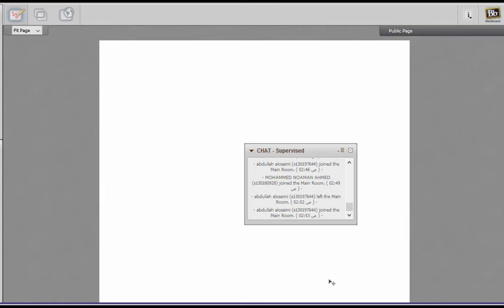It is not necessary to include the optional elements, but it may include the mandatory elements like the title of the project, the date of start of the project, date of finish of the project, the key schedules, the budget, the project manager, the project objectives, the success criteria, and then at the end the signature space. This is what a project charter should look like.